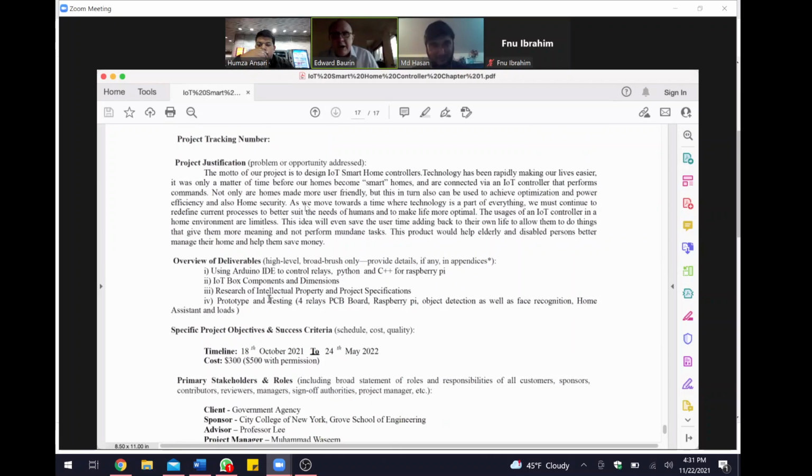Now, what are the deliverables? These are the main components which are included in your design. It's more or less like the first diagram you showed me. Yes, this is more or less, yeah. Yes, Professor. So exactly. So these are your deliverables. Yes. Each block on the diagram, that's your deliverable.